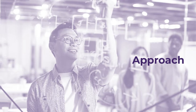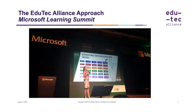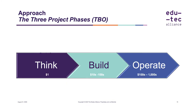Let's move on to our project approach. There are only three phases to any project: think, build, and operate. Think is all about the design work — defining the business case, obtaining the requirements, selecting software and technology, working out the processes and technical architecture, confirming the data, and ensuring the project aligns with your school's overall vision and the other projects in your programme. Think can also include feasibility studies or proof of concept mini-projects. It's always good practice to get management approval at the end of the think phase before committing time and resources to build.